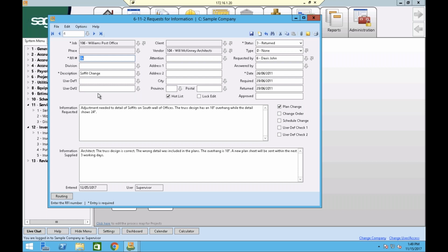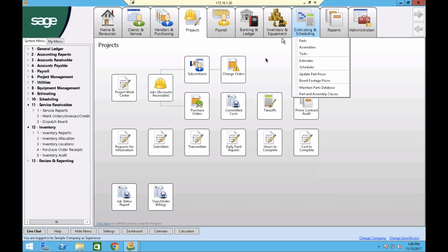The nice thing is all of these documents have dates required, date due, and who is attached to them, so I can run reports and alerts anytime to say I'm still waiting for these 3 RFIs, I'm still waiting for these 3 submittal packages to be approved. A great tool at a company level to make sure nothing falls between the cracks.